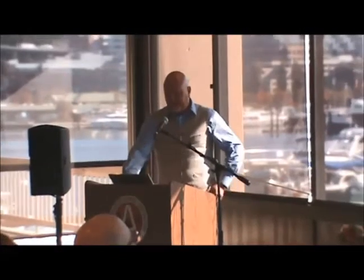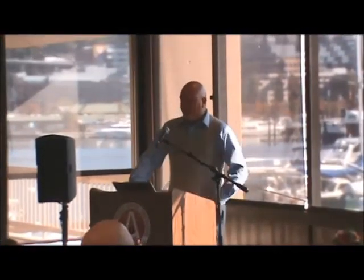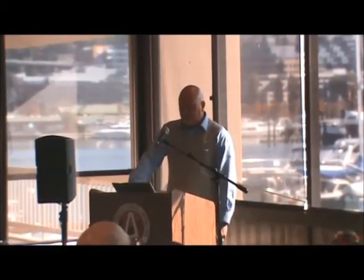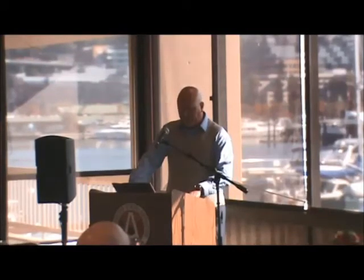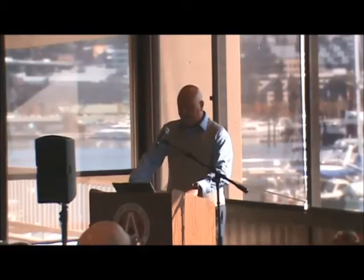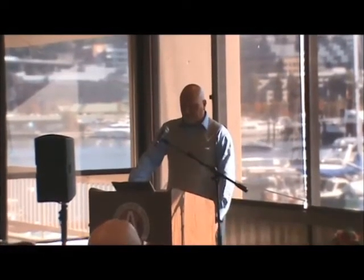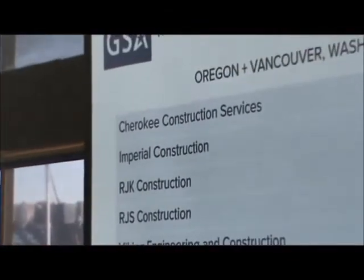As far as the majority of our projects, I indicated they are between that $50,000 and $500,000 range, and we have MATOCs in place in most of our regions. We basically have geographic areas of Seattle, Anchorage, Portland, and Spokane. So we try to get MATOCs in those areas, and typically about 70% of our smaller projects will be awarded to those MATOC contractors. So just look through those real quick so you get an idea of what we have as far as the MATOC contracts go.